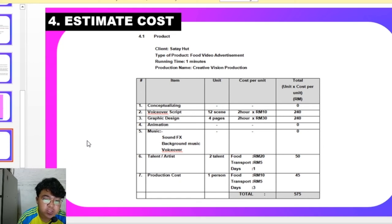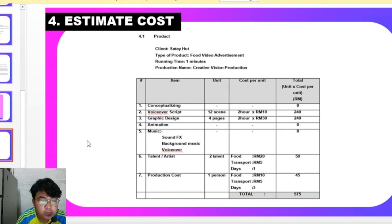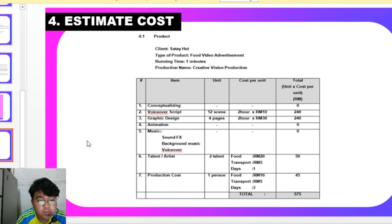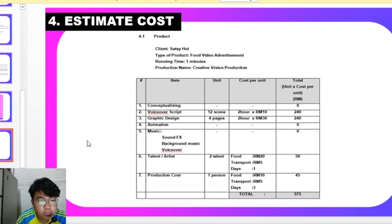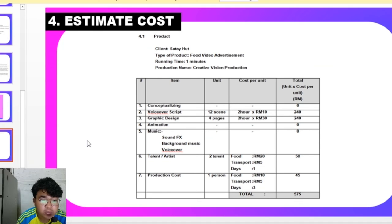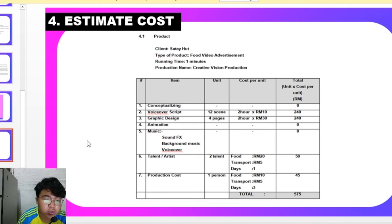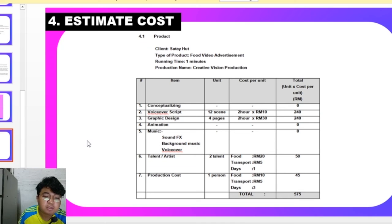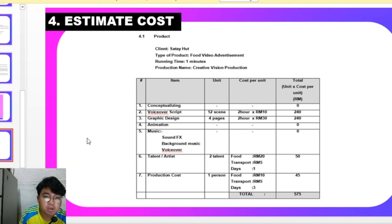For animation, we don't put any animation to this. And for music, we are going to use free music. For editing, we have two talents that will include food and transport for 1 day, and the production cost for one person with food and transport for 3 days. The total estimate cost is RM575.